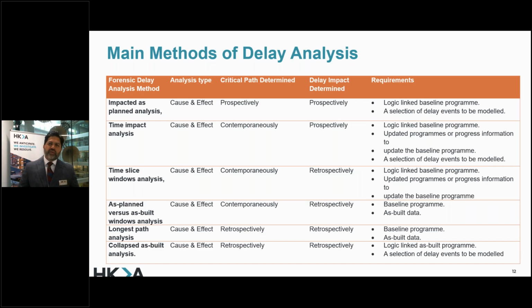Now, when we look at a project and determine what method is to be used, it's important that you agree it with the client as well. That look, to justify this delay, we will use this method. If it is not already mentioned in your contract, because some contracts I've seen do mention that the SCL delay protocol may or can be used, and some of them actually specifically determine that if there is a delay on the project, an extension of time is to be granted, your submission needs to carry out as planned versus as built windows analysis, or time slice windows analysis, or something like that, which is important.